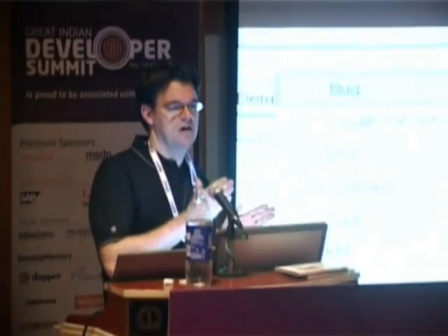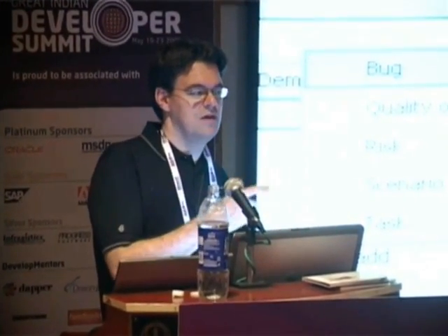So once you've done this, then you allow your team to work on a project without being hindered by time constraints, and to see what velocity they work at on that project. And what will happen is, as they work through feature by feature and complete them, you will get a range of time that it took to complete that feature.